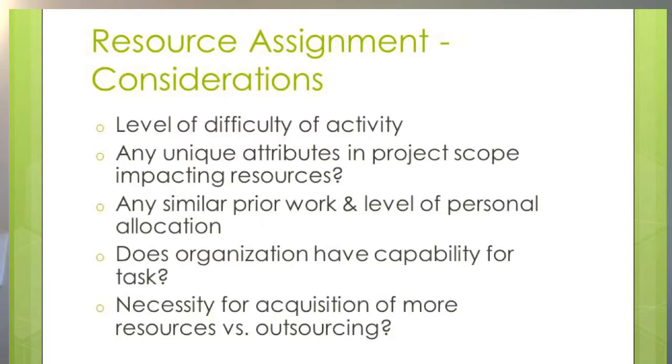organization performing the project. Some factors affecting the number of people allocated to a task and the respective efforts that they put into these tasks include the level of difficulty of the activity. For instance, do we need extra training to bring those people up to speed to be able to carry out the functions? Another factor to consider is whether there are any unique attributes in the project scope that